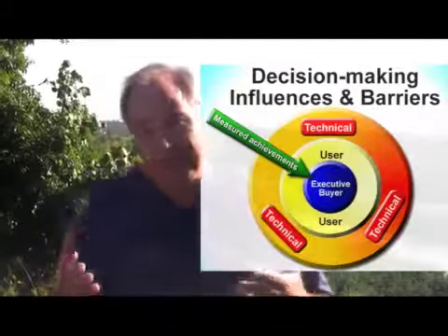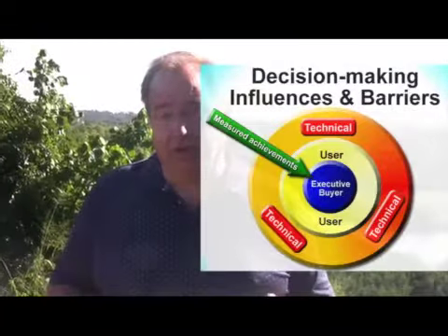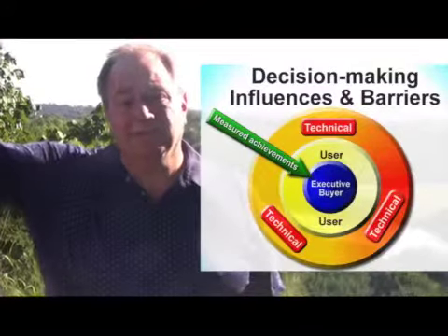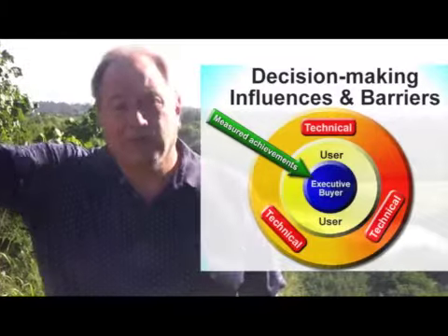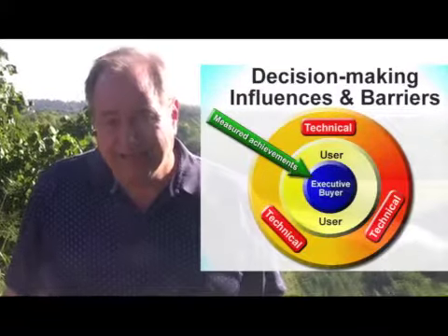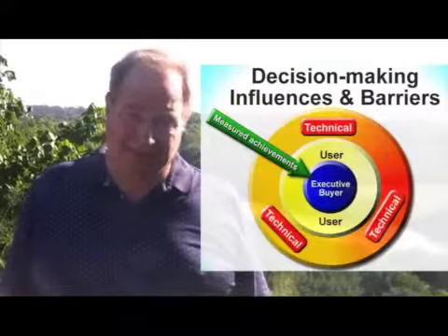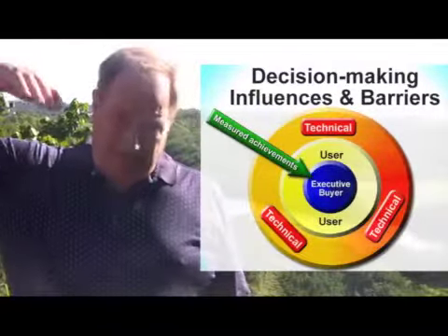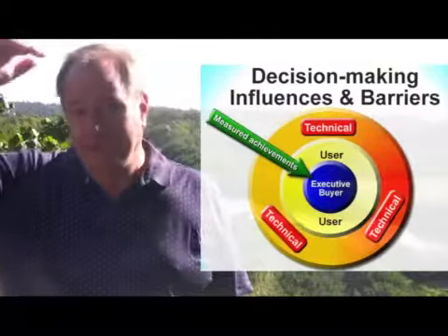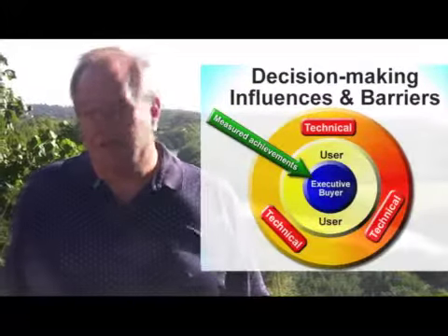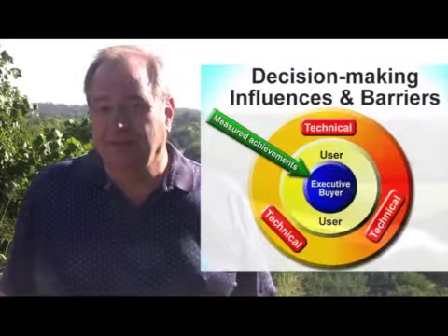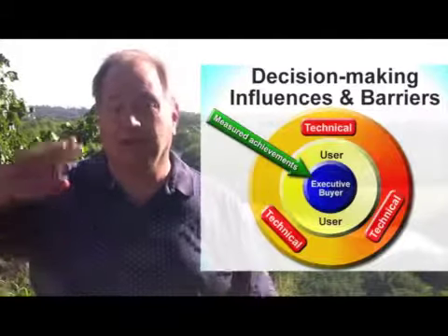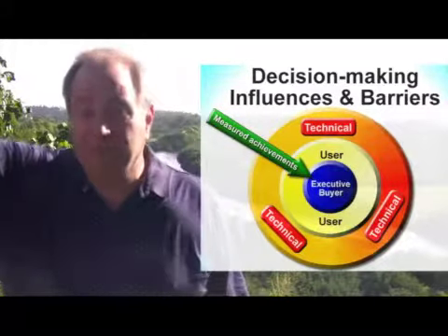We also need to come back with this first executive that we're talking to and get them to talk about what happens after the program's over. What operating results do they need to see to call the project a success? Those are the measure of success and high-level achievement numbers we need to have to carry our planning forward. So that first session with the executive, we need to try and stop them on the list of to-dos and get them talking about end results and improvements in performance.